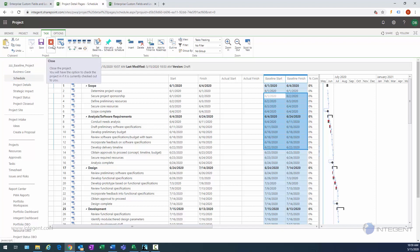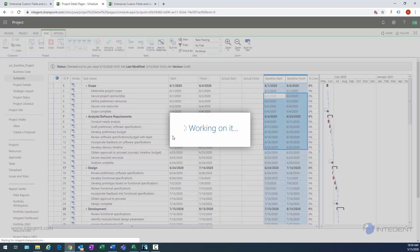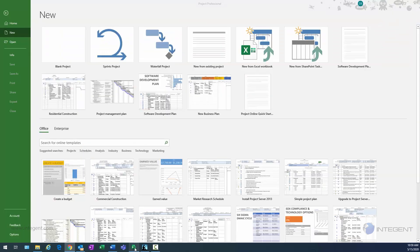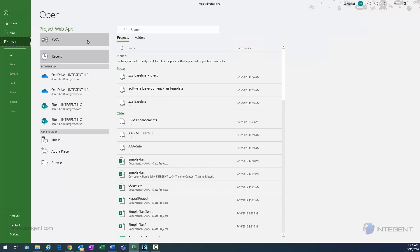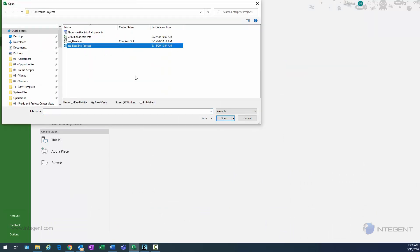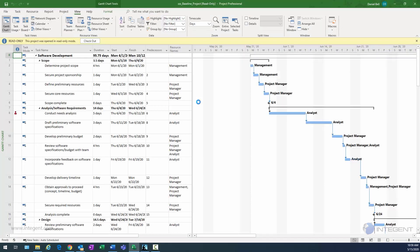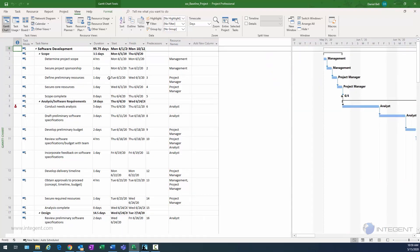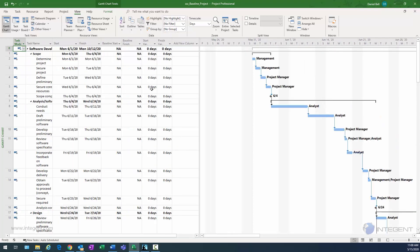I could save these values and publish the project to update all the information throughout the cloud, but I'm going to exit out and not save the project right now, because I wanted to show you the capabilities of saving baselines within the desktop client. So I'm going to open Microsoft Project and open up my baseline project. Now that it's open I'll check it out so we can make changes. The first thing I'm going to do is change my table so we can see baseline fields — from the view ribbon in the data section, I'll use the Table button and select the variance table.